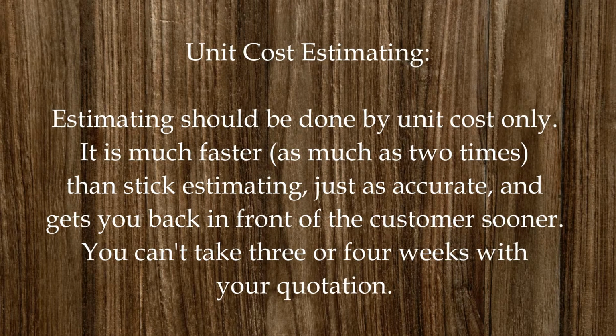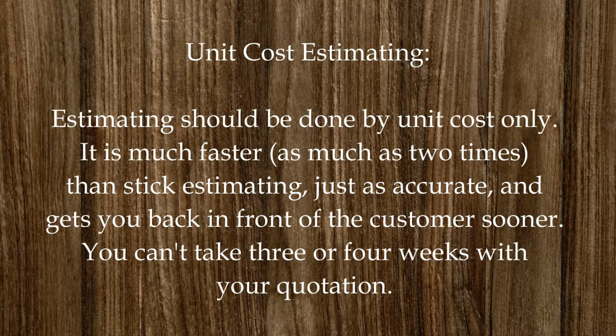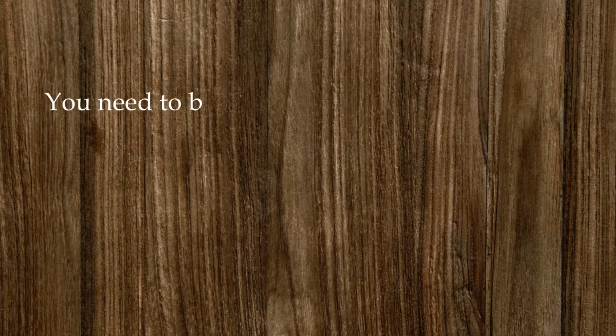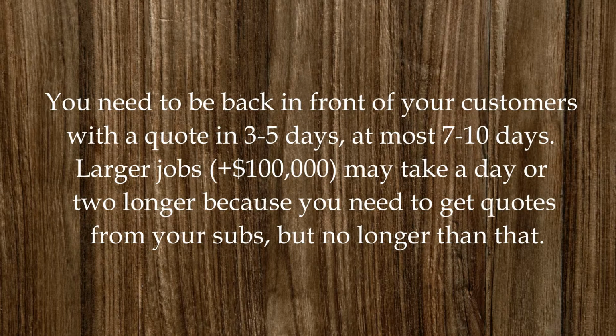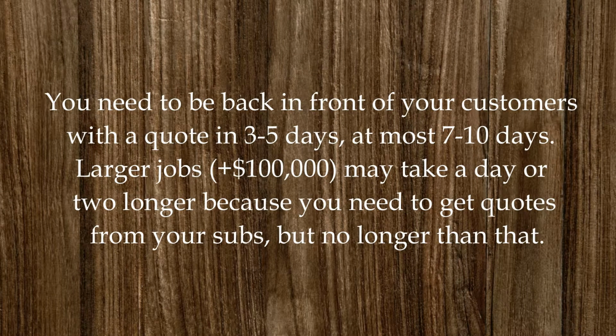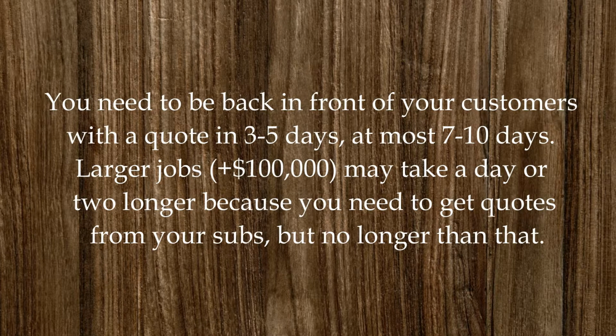It is much faster, as much as 2 times, than stick estimating, just as accurate, and gets you back in front of the customer sooner. You can't take 3 or 4 weeks with your quotation. You need to be back in front of your customers with a quote in 3 to 5 days, at most 7 to 10 days. Larger jobs over $100,000 may take a day or 2 longer because you need to get quotes from your subs, but no longer than that.